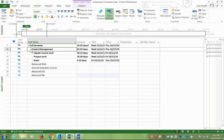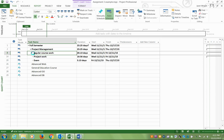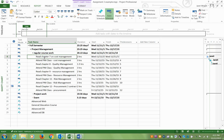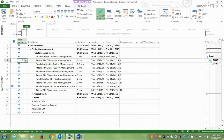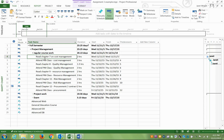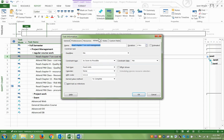I broke it into three sections. I have my regular coursework, which is the week in, week out type of stuff, which is going to follow the syllabus really closely. I read the chapter before the class. And you can see the classes here, they are manually scheduled. That's what this little thumbtack is representing. And reading the chapter, I put that as auto scheduled. If I double click, I picked here under advanced, make sure it's as soon as possible.